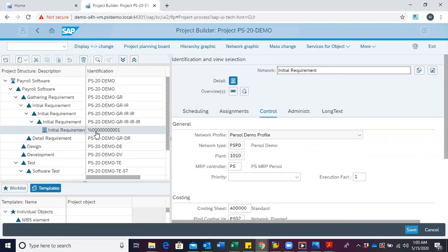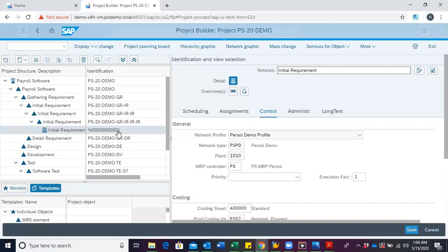Now, we can see that a code has been generated. It starts with percent, and then 00001. What happens is, with a network, through the configuration, we set a number range for networks for particular projects. The system automatically generates a code for the network based on the number range we have identified during configuration. Upon saving the project, this code will change to the appropriate code as identified during configuration.